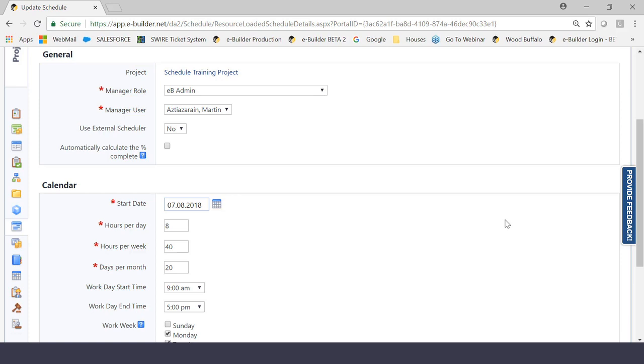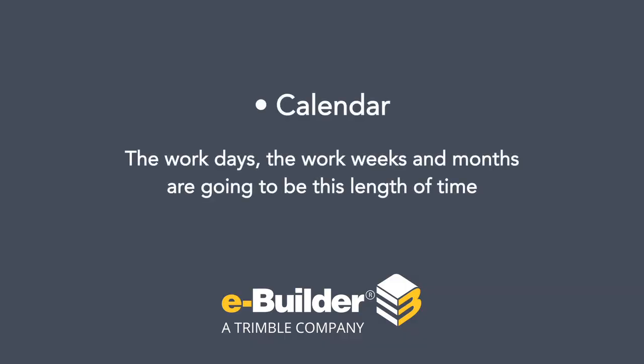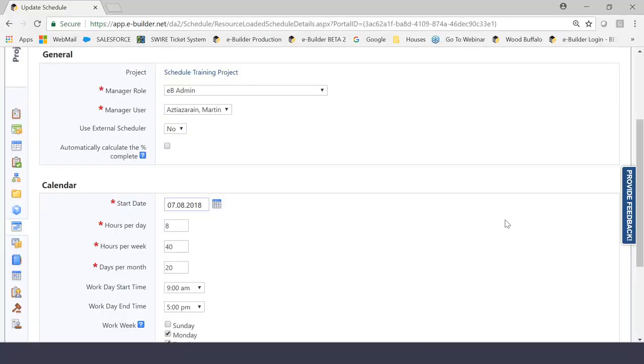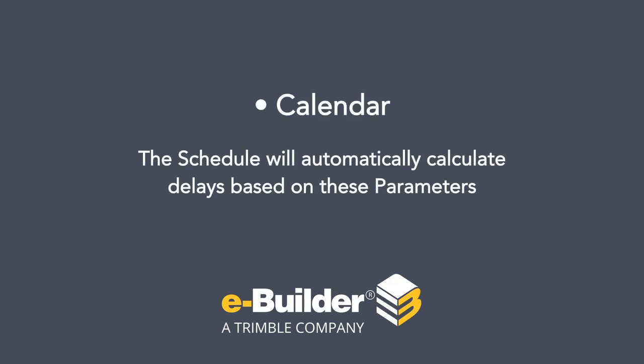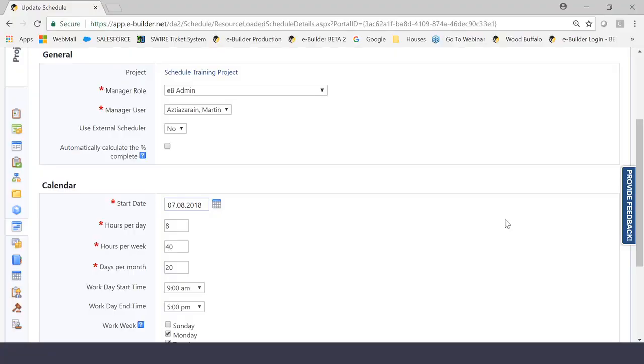Now the fields below are kind of the same thing, except just different increments of time. Hours per day, hours per week, days per month. And this is why I call this section the parameters because a synonymous term for this would be the rules of engagement. In other words, you're telling the schedule module that the work days and the work weeks and months are going to be this length of time. And the reason this is so important is because the schedule will automatically calculate delays or maybe some wins as far as getting stuff done early based on these parameters. These are just kind of numbers that will automatically calculate different time frames for your activities. And you'll see that when we actually set up our schedule for the first time based on these parameters.